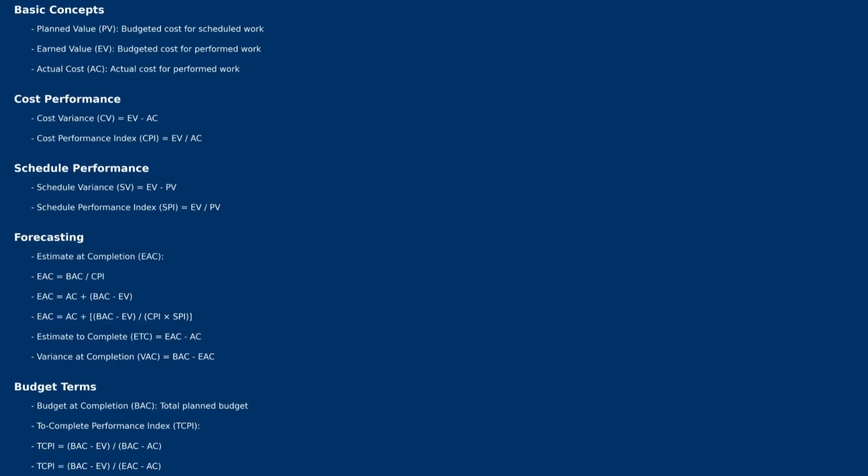As you can see, the CPI is greater than 1. When the CPI is greater than 1, the project is good. So you're doing well when it comes to project budget. But since SPI is less than 1, it means you are running behind schedule. So you should take options to improve the schedule and bring it back on track. You should focus only on schedule.